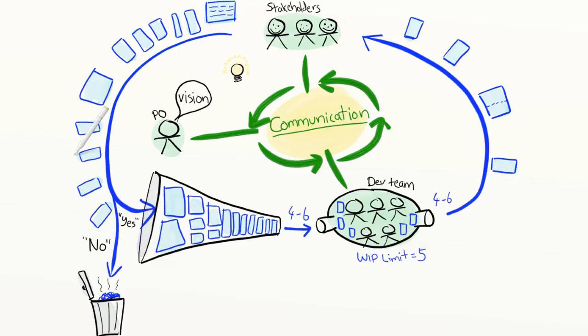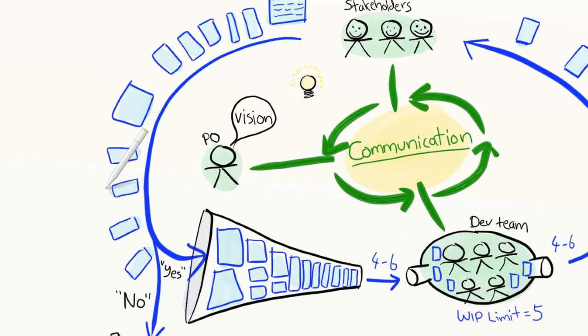To be able to prioritize, the product owner must have some idea of the value of each story, as well as the size. Some stories are critically important, and others are just bonus features. Some stories take just a few hours to build, and others take months. Now, guess what the correlation is between story value and story size? That's right, none. Bigger doesn't mean better. Think of any system that you've used, and I bet you can think of at least one really simple feature that is very important, that you use every day, and I bet you can think of at least one huge complicated feature that is totally